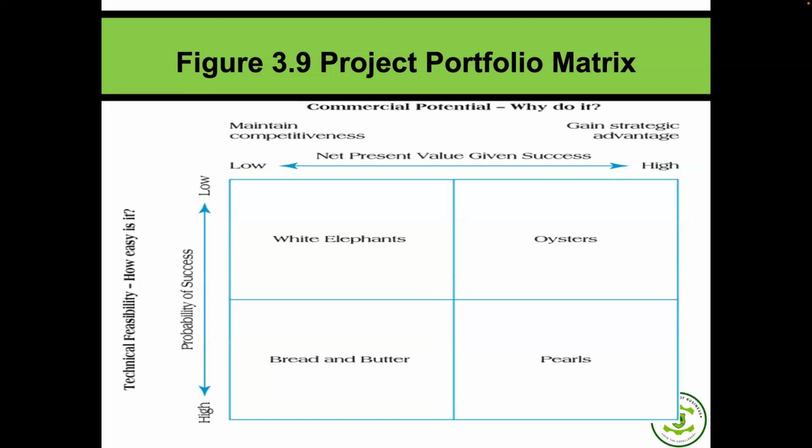In terms of success, is it successful? The project was almost completed. But in terms of finance, in terms of all project metrics, it is a runaway. Everything is a runaway. Delivery, the time has passed. Costs, they have overspent. Everything they have outrun. And no show, and the project has become what? A white elephant. So normally in English parlance, when they say white elephant, they may mean a useless project. But in project management parlance, white elephant projects are projects with low probability of success and with very low commercial potential.